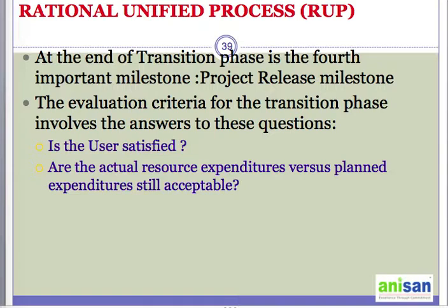Considerable effort is extended in developing the user oriented documentation, training users, supporting users in their initial product use, and reacting to the user feedback is important. At this point, the user feedback will be confined primarily to product tuning, configuration, installation, and usability issues.